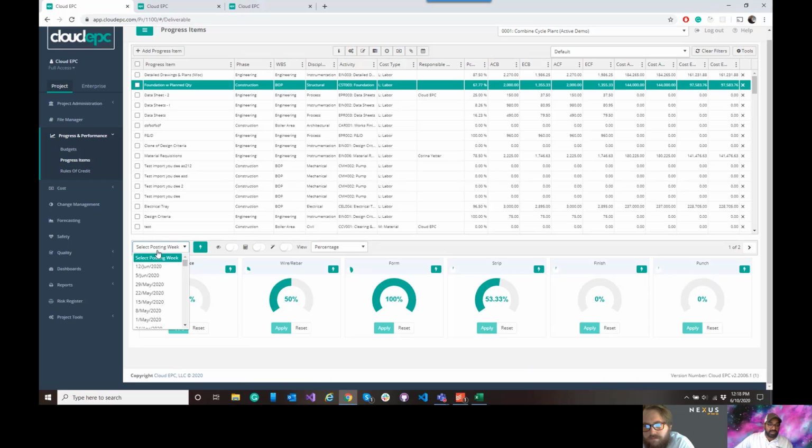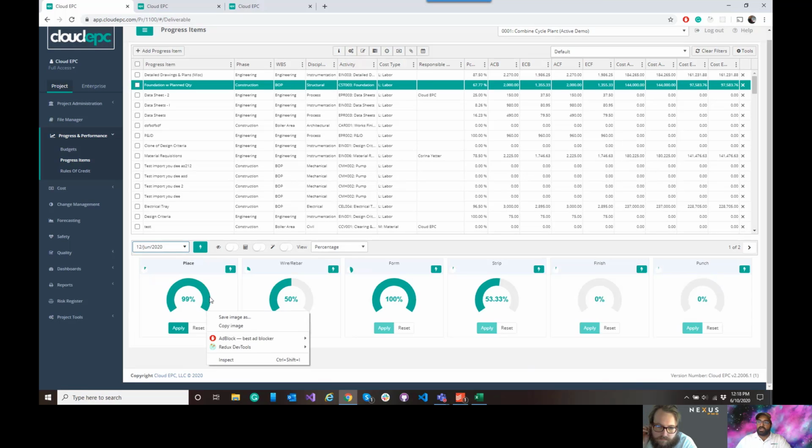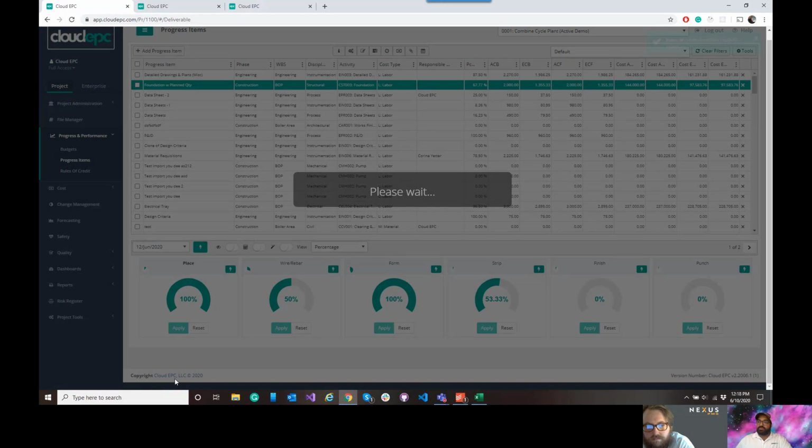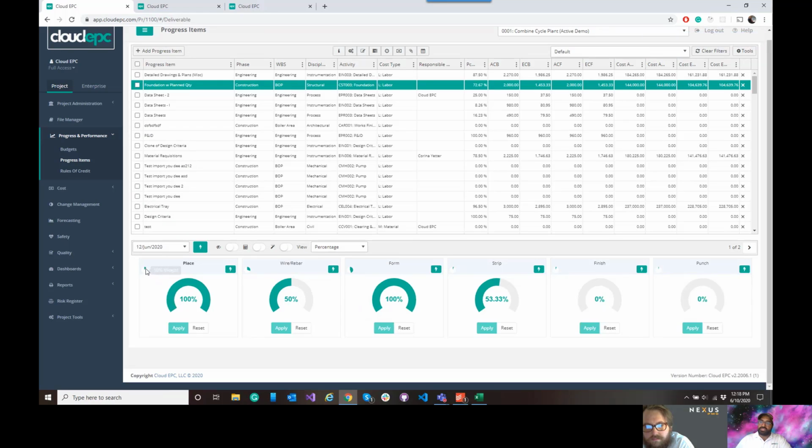And so we do time phase in the system, although we've created a UI that makes it look very flat. And so we pick what week we're updating for. We update, let's just say we were complete. And then we simply took 100% times that 10%, and that 60-something odd percentage I was just referring to is now 72.6% complete, effectively using that weighted value. And then the earned value, or in this case, that allocated 2,000 times the 72%, is going to give us our earned value of 1,400 hours in this case.